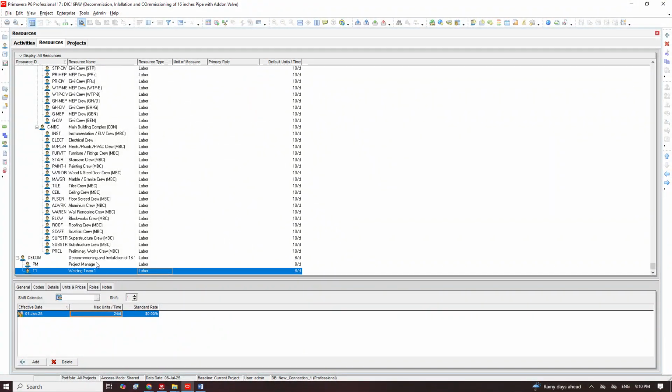Then the next thing you need to note is the cost. Let's say the helper, one of them is going at $10 per hour. So now I have two filter guys, which is $20, each of them taking $10. Then the welder is taking higher money, which is $20.